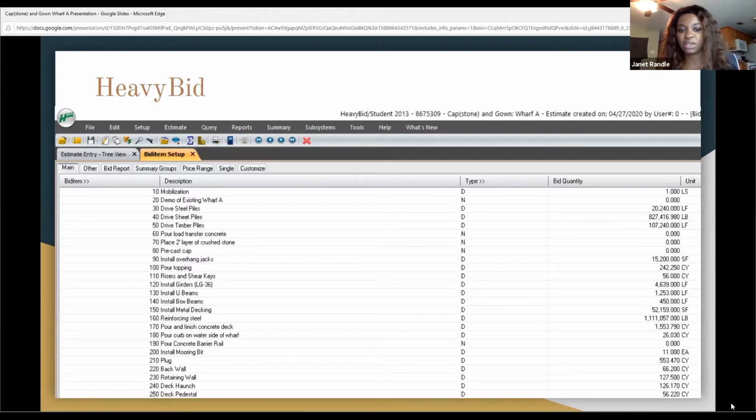We had to determine the shifts and crew hours for each activity, and we decided that our crews will work Monday through Friday with 10-hour workdays. We also used the quotes provided to us from multiple companies to determine the materials and their price.